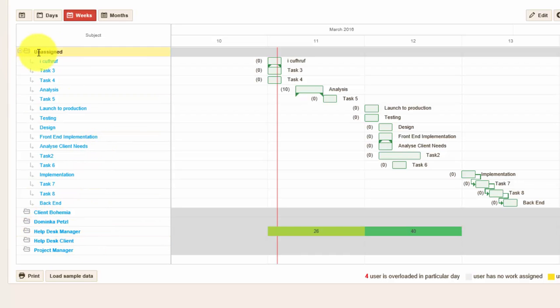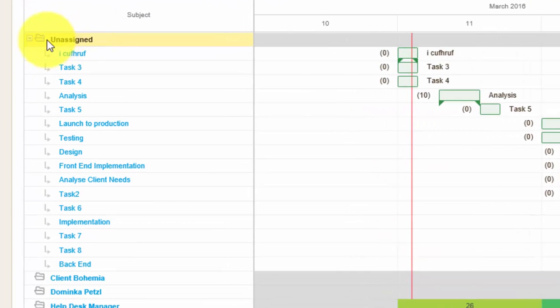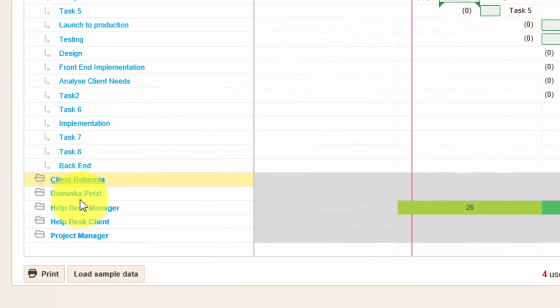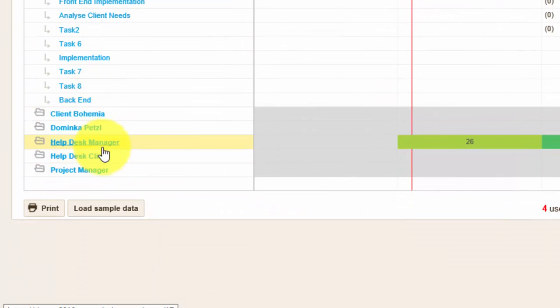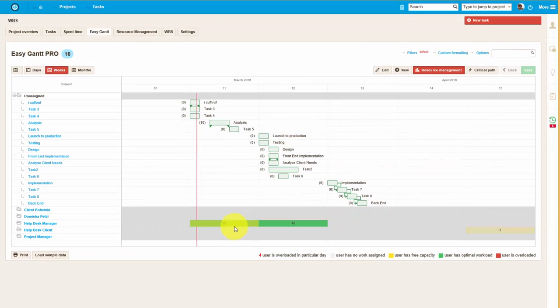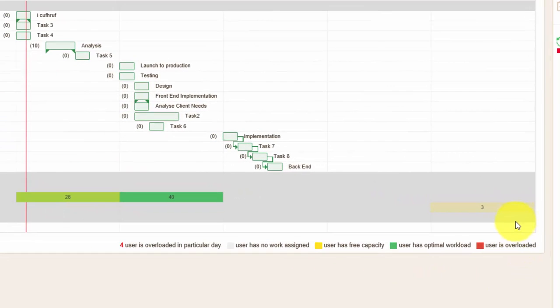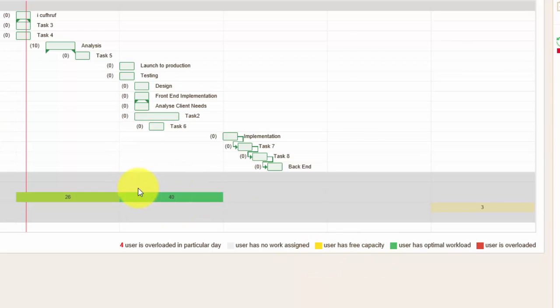As you can see over here, these tasks are currently not assigned. If we look at the workers here, we can see their workload for that particular week, and as you can see it's color-coded. Yellow means there is still free capacity, green means optimal workload, and red means that this user is overloaded.